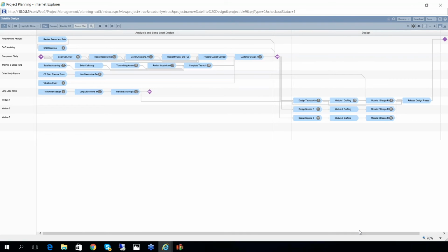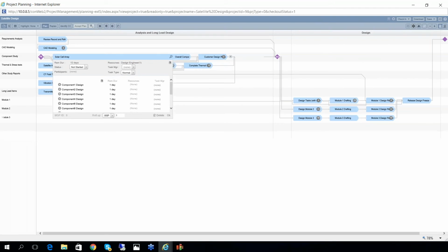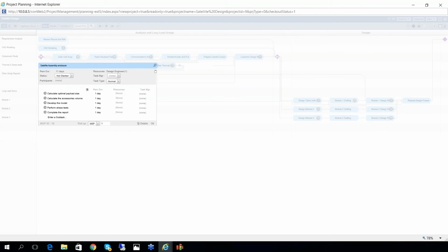And again, let's look at one of the examples of task versus subtask. What you can see is that all these activities inside a task have to be performed, and those details are necessary for the IPT lead, who is the task manager in this case, to know all the detail that needs to be done. But that is a detail that is relevant only for the IPT lead. It's not relevant for the project.